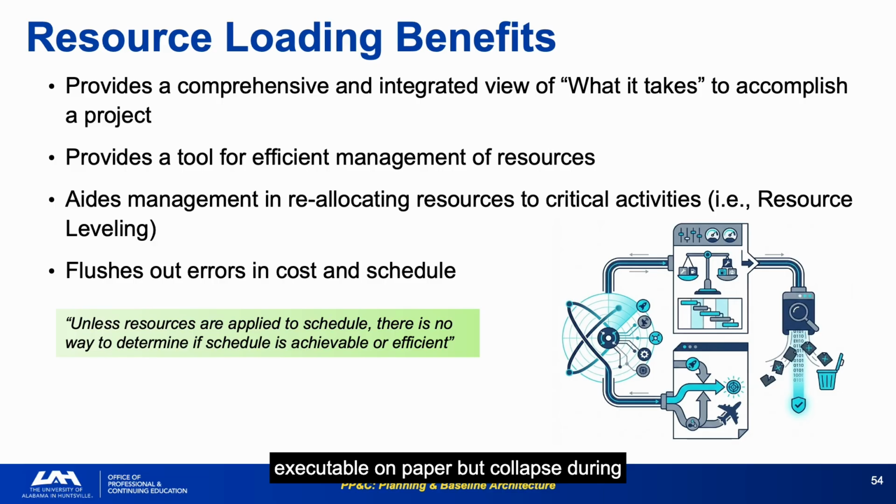collapse during execution. Resource leveling, the process of resolving resource overcommitment, is only possible if resources have been loaded in the first place. Programs that skip loading skip the ability to detect overcommitment before it causes schedule slippage. NASA doesn't always do full resource loading, as Bill notes, but that doesn't mean it is optional on programs above the JCL threshold. Know your program's requirements and push for resource loading where it matters most.